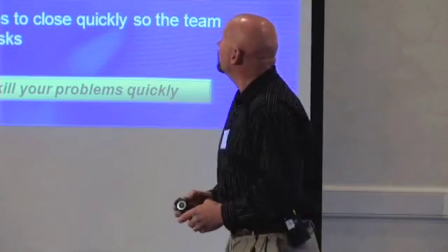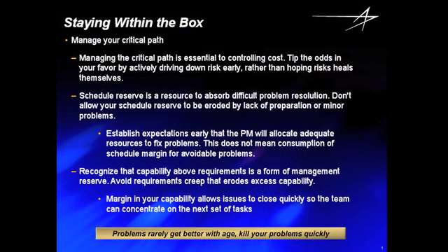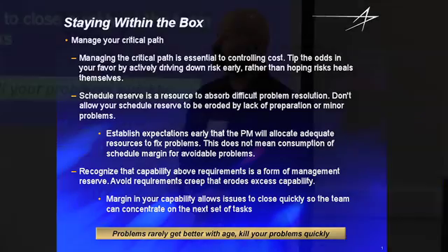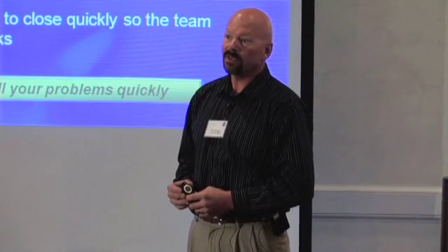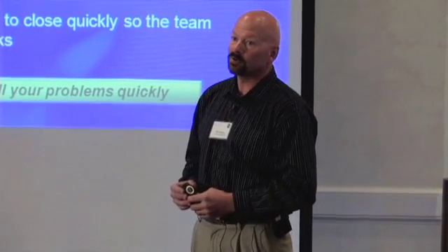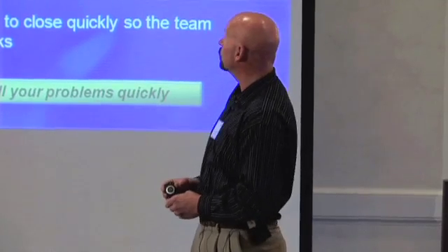Okay. So the reserve is there, but the schedule reserve is really only for those tough problems. It isn't for the things where, you know, I like to get home for dinner too, but it doesn't always work that way. So sometimes you just have to ask people to suck it up and not allow that schedule to get eroded early in the game, because you know you're going to need it late.